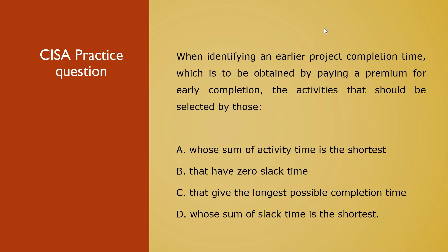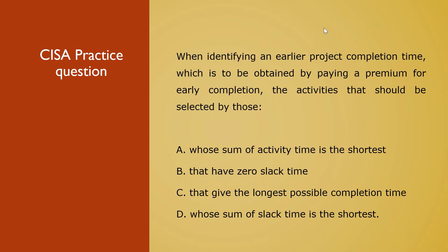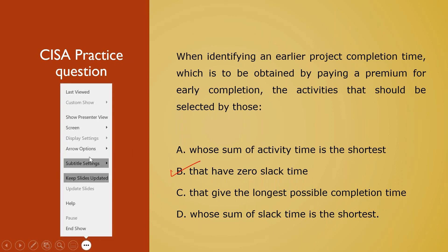A critical path is defined as having zero slack time. On a critical path, you cannot delay any specific process even by a minute — if delayed, it will impact the overall closure of the project. The concept is: activities on the critical path have zero slack time, meaning they must be completed exactly on time with no delay allowed. Conversely, if a path has zero slack time, it is a critical path. The project must be completed within the earliest possible time — that is the keyword. Completing within the shortest time means working through the critical path, which has no slack time.